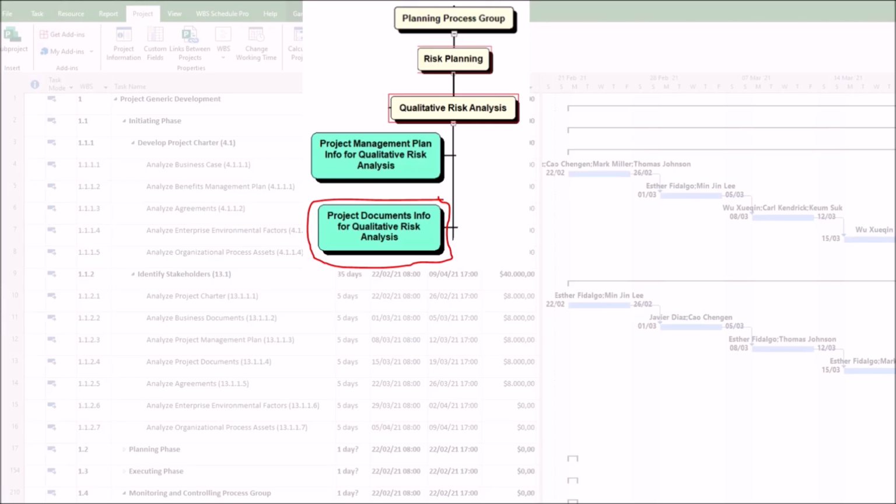What happens without robust project document input? First, the analysis becomes generic. Risks are evaluated based on gut feeling rather than project specifics. Second, poor prioritization. You might misclassify a high-impact risk as low, or vice versa, leading to misallocated contingency resources. Third, lack of credibility. The risk ranking will not resonate with stakeholders or align with known project challenges. Fourth, ineffective risk responses. Prioritization drives response planning. If prioritization is flawed, you will develop responses for the wrong risks.